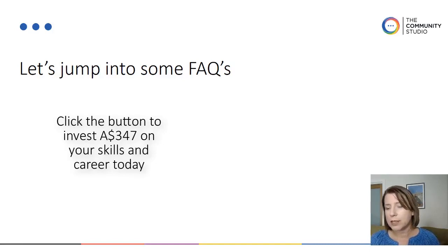Another question that comes through quite a lot is: well, I've got a comms plan, I've got a media plan, and surely that is enough. And the answer to that is no, it's not. A comms plan, as we have seen, and a media plan too, if you are working in that space, as we've seen from that model of engagement, you are working in Inform.